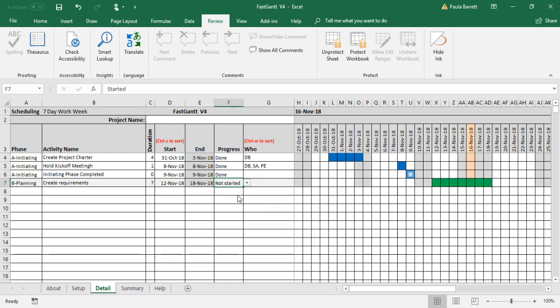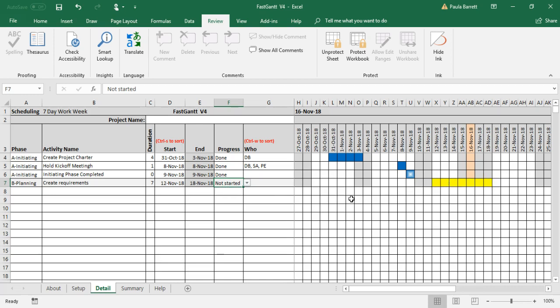If we had not started, let's say it was not started, you can see that it would be a yellow status. The system's kind of detecting something's wrong in that we're a few days past our start date and we're not even started. So that's an issue. And you'll see that yellow show up to say that there's some issues that are starting to take place that you should be concerned about.